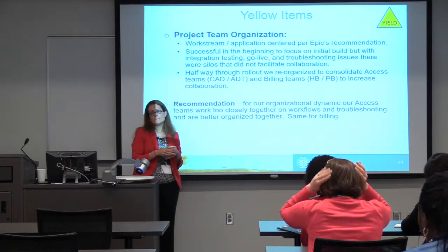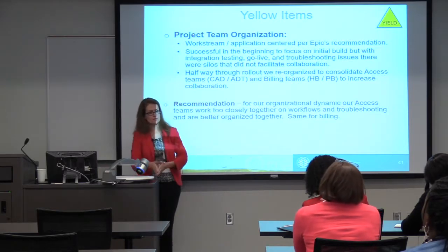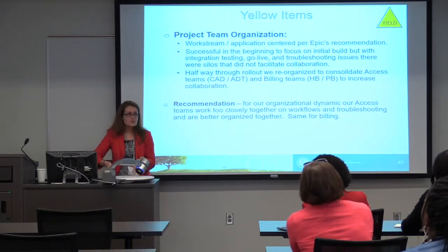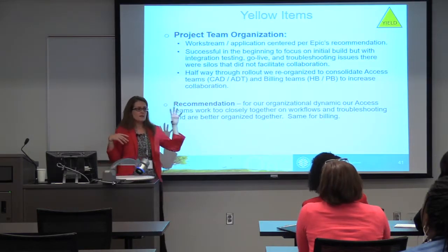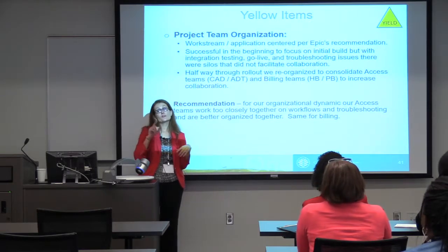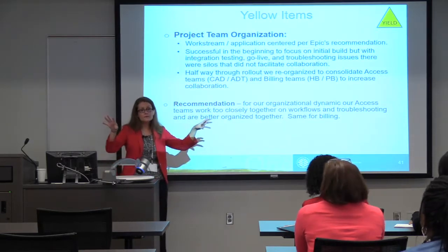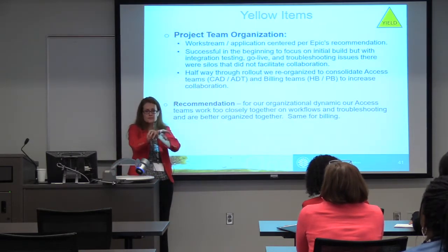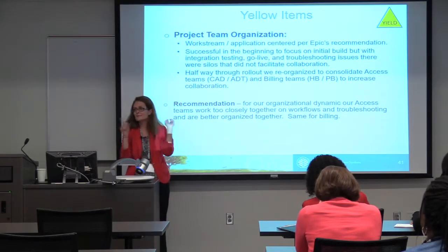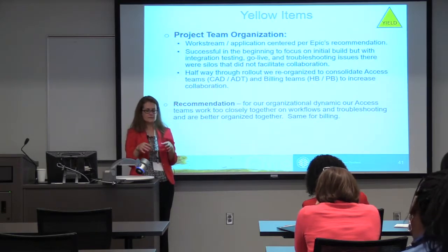because those folks were having to become subject matter experts at those modules. But over time, as we got into integration testing, and as we got closer to having issues and problems, for example, the registration and scheduling team would be like, oh no, that's a scheduling problem. Oh no, that's a registration problem. And then those two didn't have a clue about what was going on in the other two teams, and they basically were telling us the same thing. I would go to the other team, and then they would say it to the other team. It was just finger pointing. And there was not a lot of cross-training across the two teams.